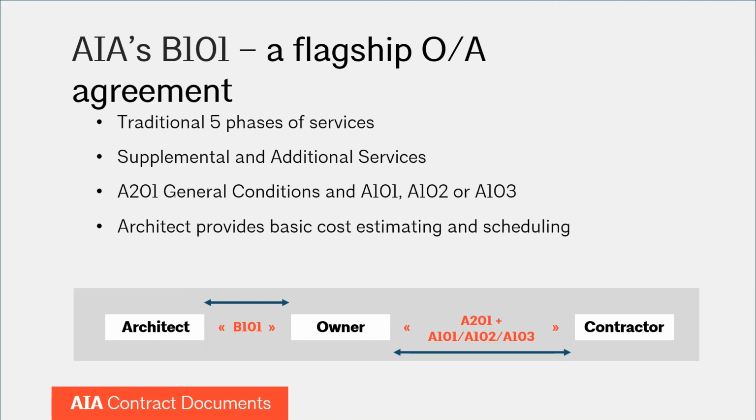You know, another project, the owner wanted to sell his lot and assign his contract with me to the purchaser. That's something you don't see addressed very often in a letter agreement. 10.3 in B101 made it clear that they needed my consent to do this. I did not mind the assignment. We just wanted to design a new home, but a change of owners necessitates additional effort on our part in order to get things rolling again. I explained this and they agreed to the assignment on the condition that the new owner pay us for that added effort.